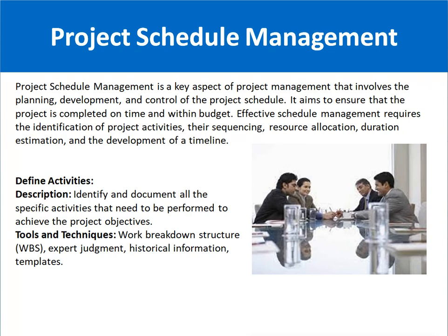You have to sit with them, try to understand his objectives, and based on that, first of all you have to do the scoping and build the work breakdown structure. You have to discuss with expert judgment, the domain experts, and also check the historical information, like whether in the past you have already done such projects. Based on that, you have to identify the activities to build an e-commerce website. Just an example. First of all, you have to identify the activities for the project.